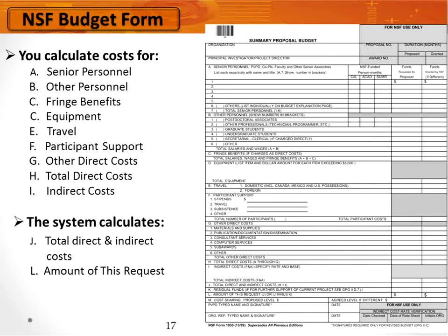These NSF budget categories are likely to be different than the budgets you may work with at your college. It is important to understand how NSF interprets each of these categories so that you can plan and submit your budget accordingly. Once funded, you will then need to work with your business office to develop a clear crosswalk between the NSF budget categories and the budget codes that will be used by your college. Now, let's look at the budget categories.